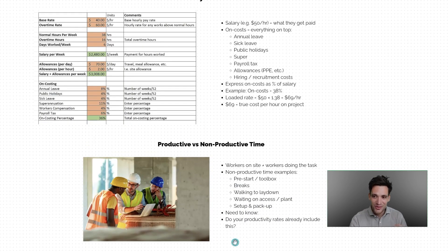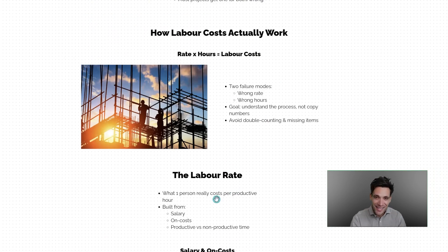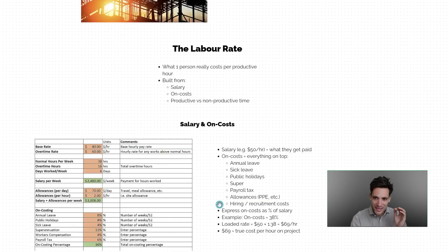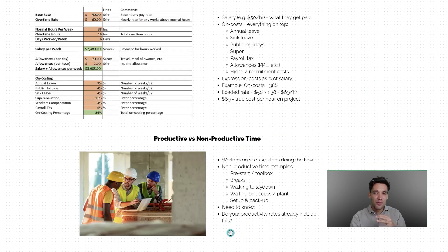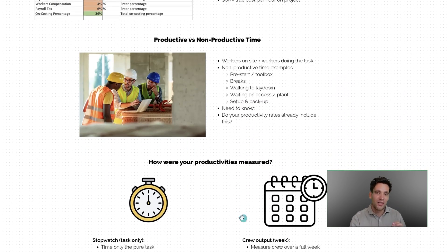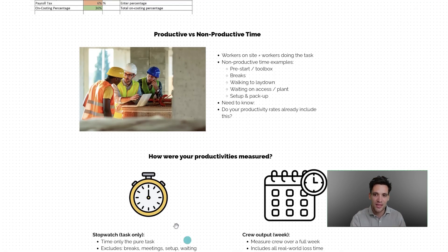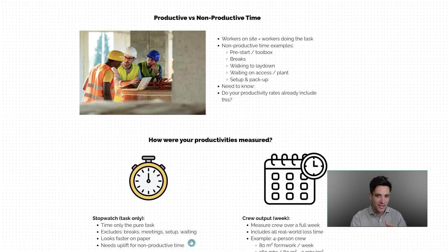Here's where things start to get a little confusing, and why understanding the process matters more than copying the numbers. When we talk about applying a productivity rate to this cost, some people will include non-productive time in their productivity rate, and some people won't. There are two ways to measure productivity for a task: the stopwatch method, which is purely the task productivity and excludes breaks, meetings, setup, and waiting — it looks faster on paper, but you need to factor in non-productive time separately.